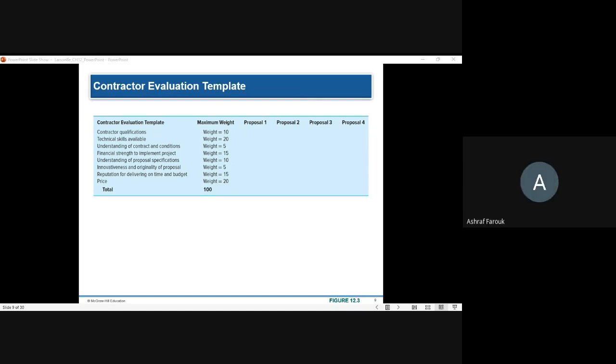And how can we decide the score, how can we give this 8 or 5 to each? Oh, yeah. You might have some experts from the procurement department or from the technical department, someone who has expertise in this technical area. And you will compare these proposals and you will see, okay, this contractor, for example, has 3 engineers with PMP.